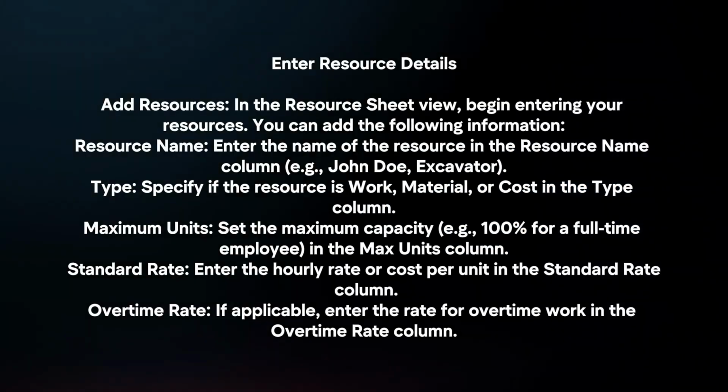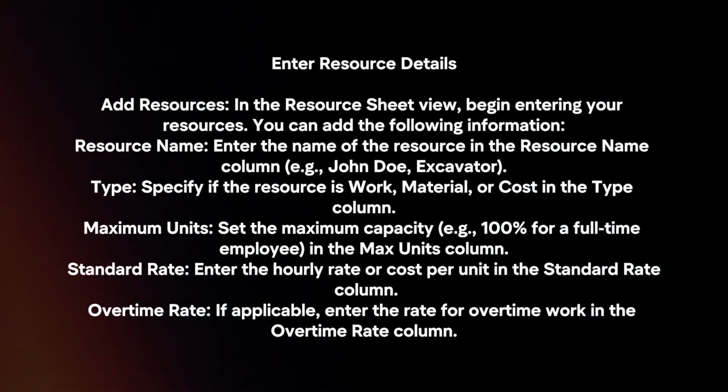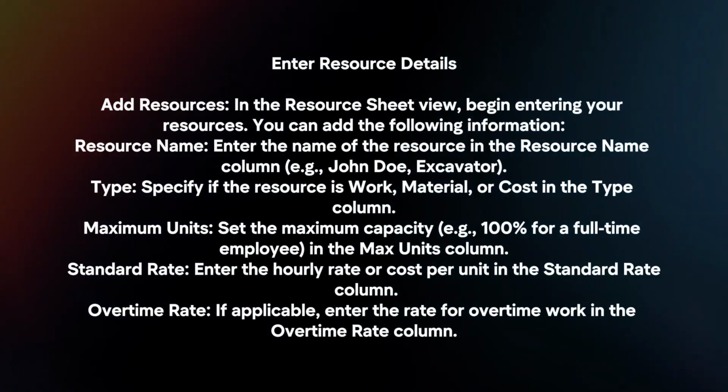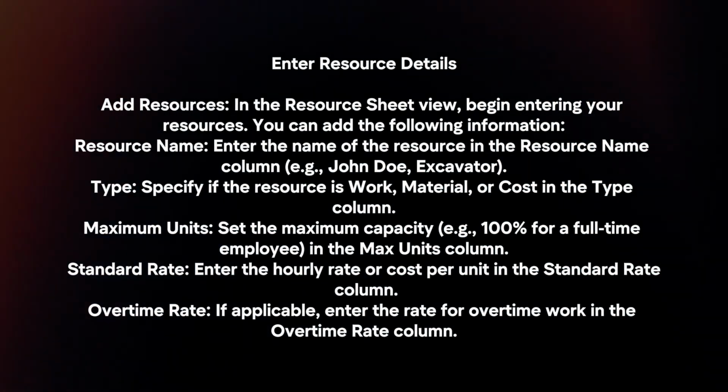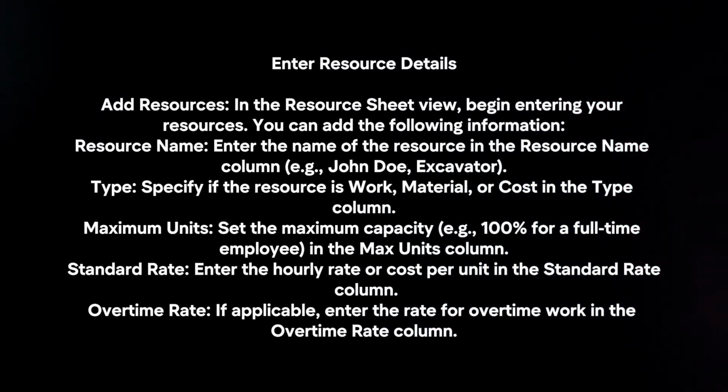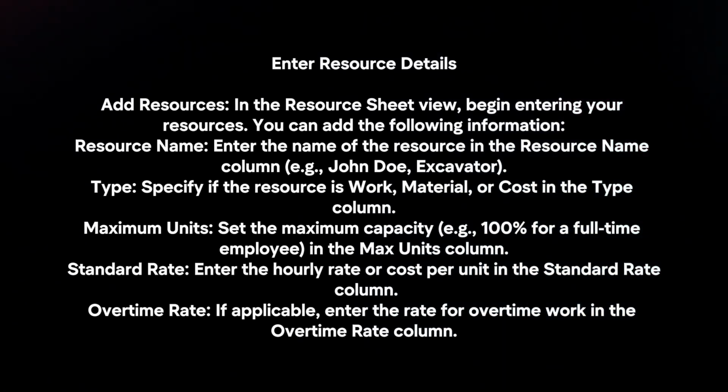Enter resource details. Add resources. In the Resource Sheet view, begin entering your resources. You can add the following information: resource name, type, maximum units, standard rate, overtime rate.